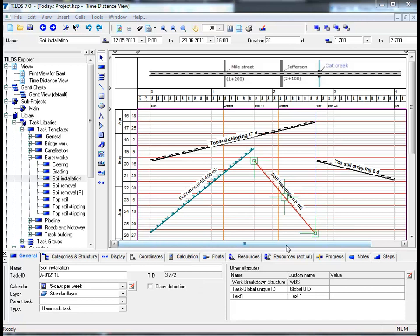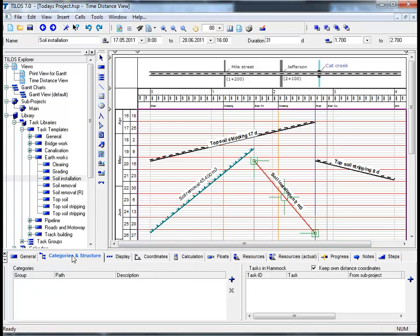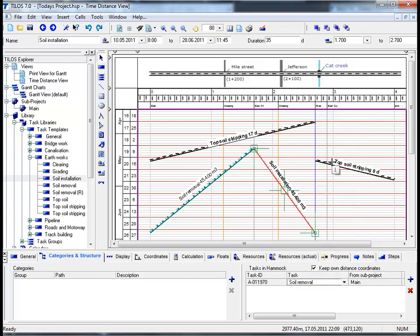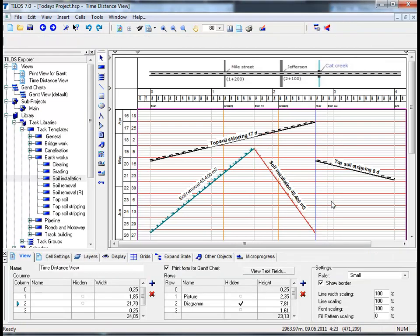The task we have just inserted is a so-called hammock task. A hammock task is defined in a way that it receives all the information - duration and quantity - from a subtask. By going to the Details Toolbar, click on the view tab Categories and Structure. Moving over to the Task and Hammock box, click on the plus sign, click on the task field, select Soil Removal, and you can see that the hammock task has successfully adopted the 45,400 cubic meters as well as the duration of the task it has been assigned to.